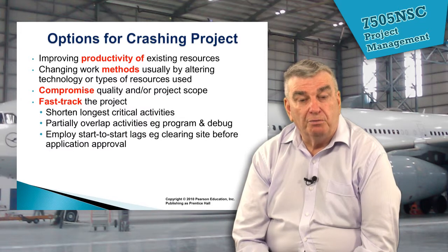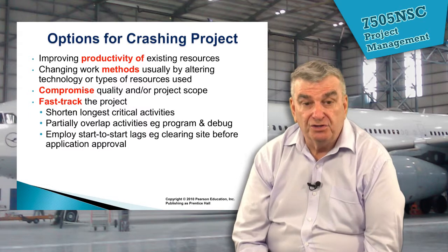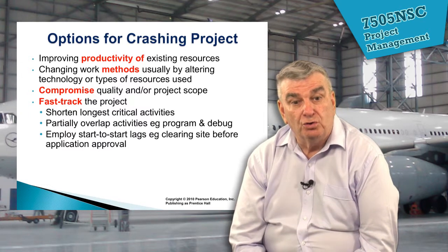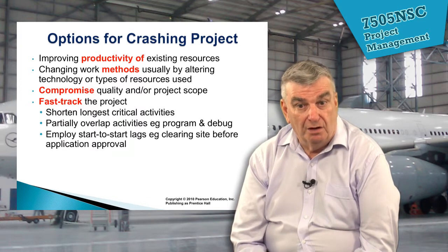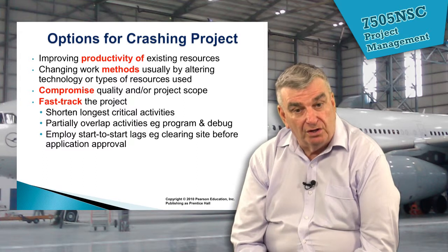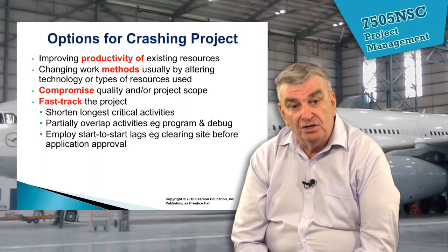We can fast track the project, and the obvious one after studying critical paths, we can shorten the longest of the critical activities. Or we can partially overlap activities such as programming and debugging, and this is where we can use the actual laddering that we discussed earlier.